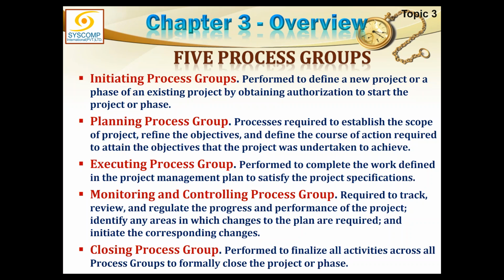Now we submit our results to the closing process group, which is responsible for a closing audit and which puts everything in order. It ensures that all the work has been done, all the deliverables are available to be handed over to the customer, and all the lessons learned, organizational process assets and historical data and everything is to be handed over, to be populated in the organizational process assets. So closing is the last process group where everything culminates.